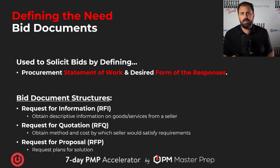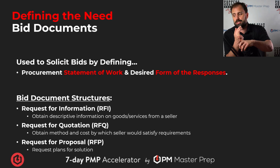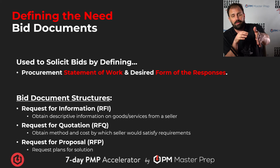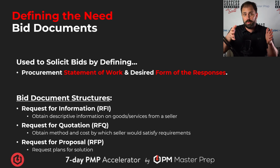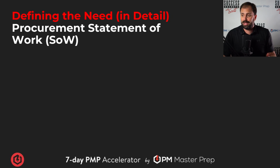Or it could be a request for quotation. We want the method and cost by which the seller would satisfy it. We need you to nail this down. How would you do it? What's the quote? Get it back to us. RFQ. Or an RFP: we don't know how to do it. What would be your approach? We want the plans for the solution. Here's a unique problem. Solve it. Here's the RFP. Bring it back to us. That's the framing up there.